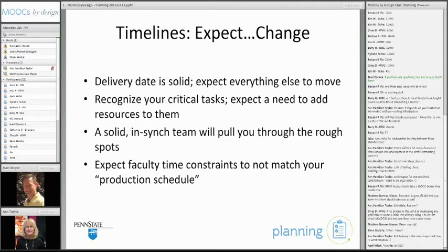We knew, for example, April, I'll pick on you again, we knew April was going to be going on maternity leave. We had to plan for some backup, make sure that we had people lined up. She was incredible on having detailed notes and action lists so that she could make that handoff. The horrible joke we make in our office about so many things is, you could get hit by a bus tomorrow. So you always want to make sure that everyone on the team knows where everything stands and is ready to jump in if there's an emergency.